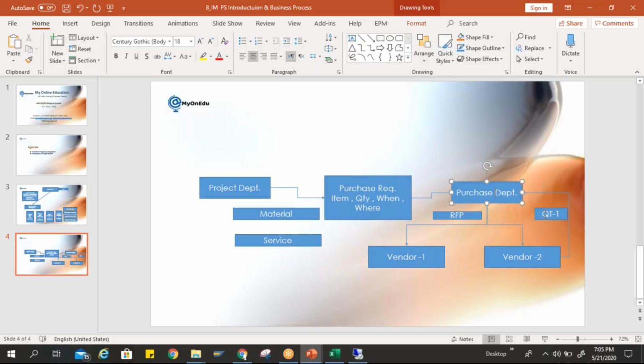Second is the financial evaluation. If my contract is very big, will they be able to handle such a big contract or big purchase order or not? Once that is finalized, we also check legality. Let's say they are able to deliver technically and financially, but legally they are not paying tax, or they have many legal charges against their organization and a very bad name in the market. As per my organization's strategy, we can decide whether this particular vendor will participate in my bidding procedure or not. So there are different parameters.